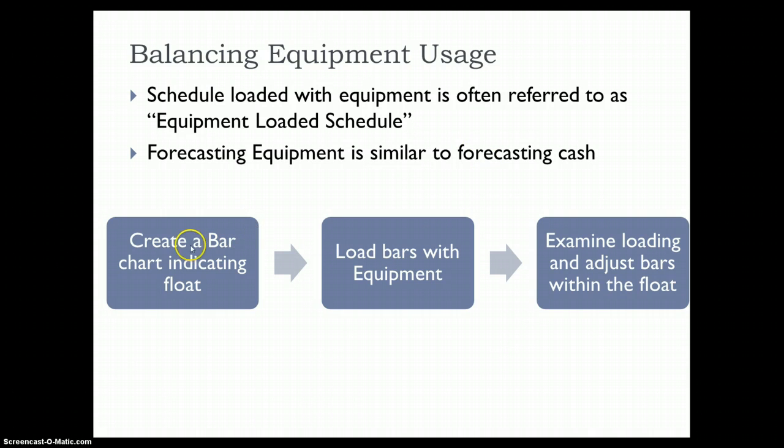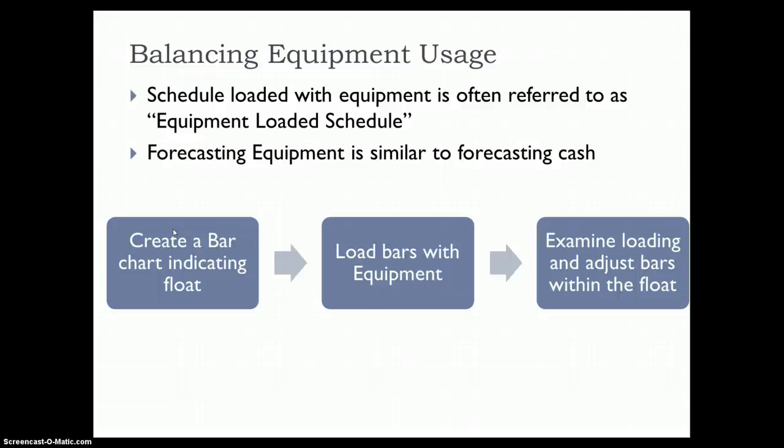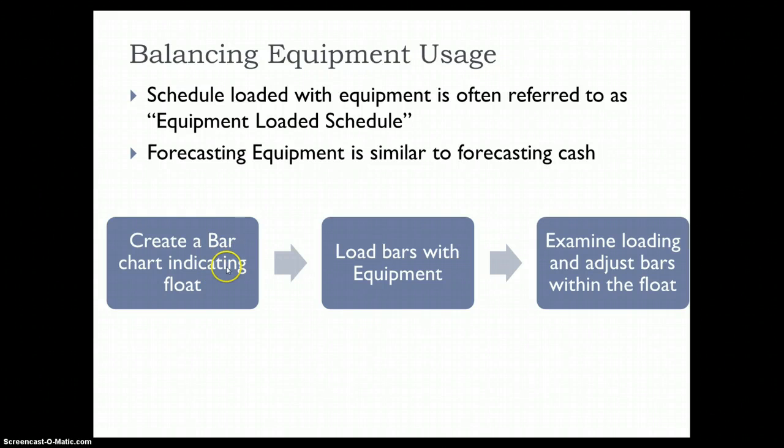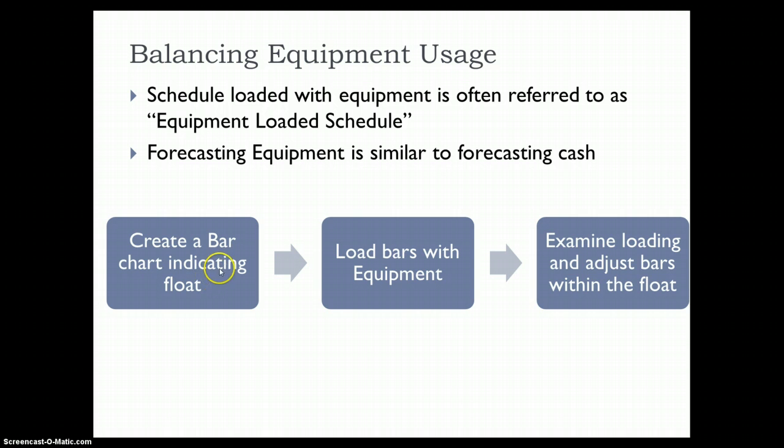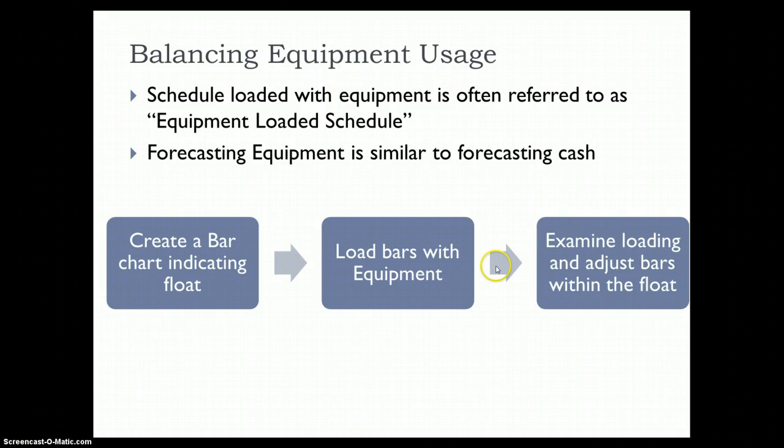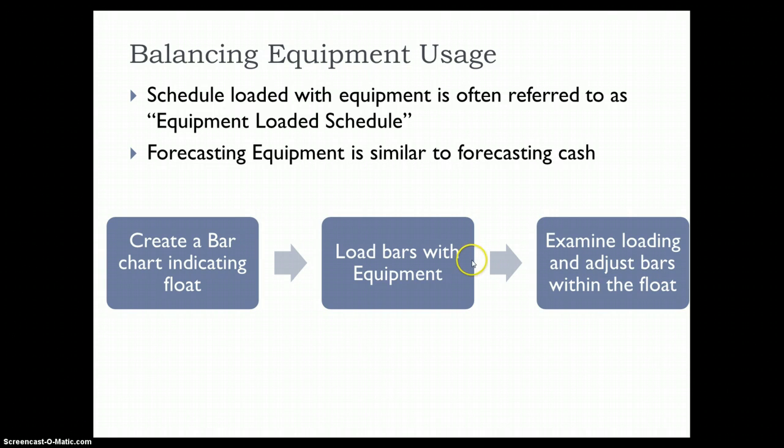The process is that you start by doing your critical path analysis. You draw your logic diagram or precedence diagram, do the forward pass to identify early start and early finish times, then do the backward pass to identify late start and late finish timings. We use this knowledge to identify the float for each activity, then use this information to plot a bar chart clearly indicating the float. Once the bar chart has been developed, we can load it with equipment, and then we can examine the loading and adjust the bars within the float.